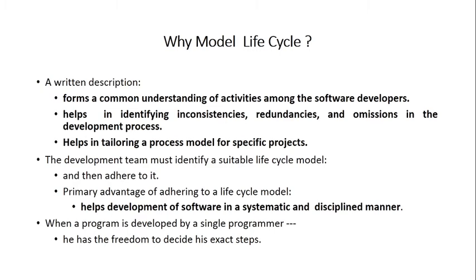Systematic and disciplined approach of developing software is enforced by this model. If you are not going to follow any model, it won't be systematic and disciplined, because in the model we have a series of steps which are identified and we carry them out in a particular order depending upon the model. Say if you have the waterfall model, the sequence of steps is simple: feasibility study, requirements, designing, coding, testing, implementation, and maintenance.